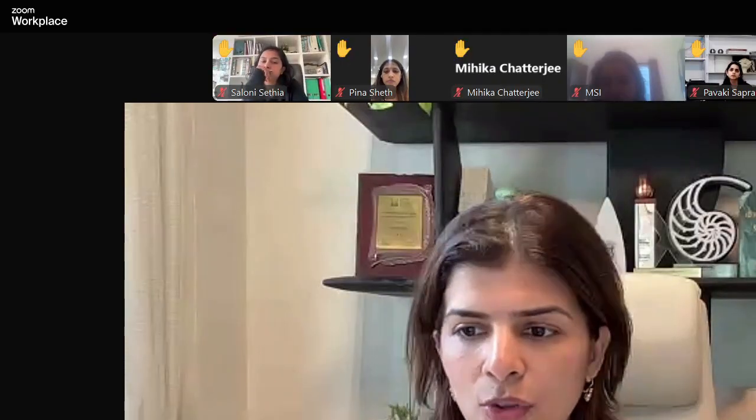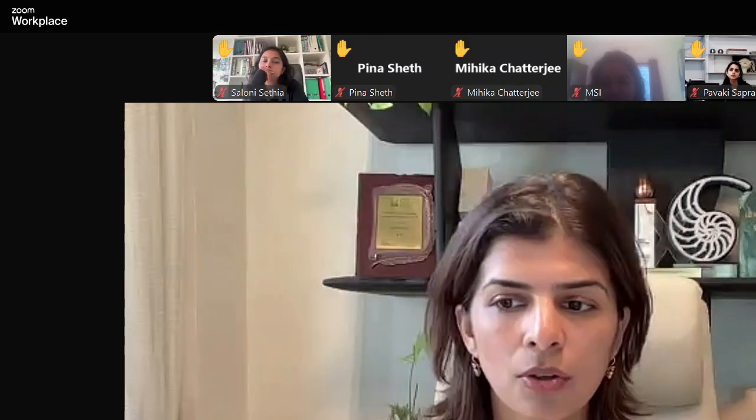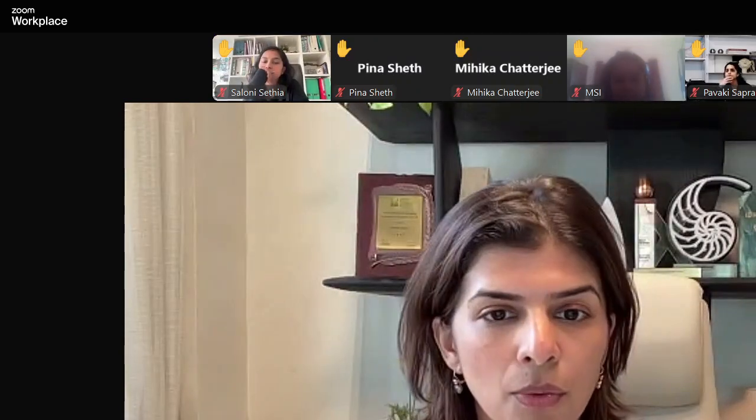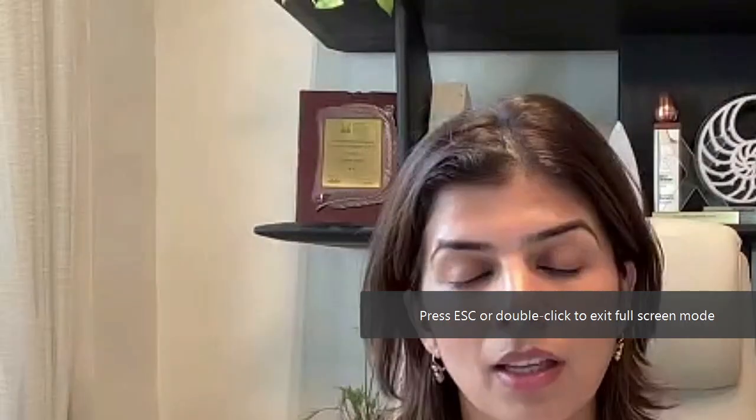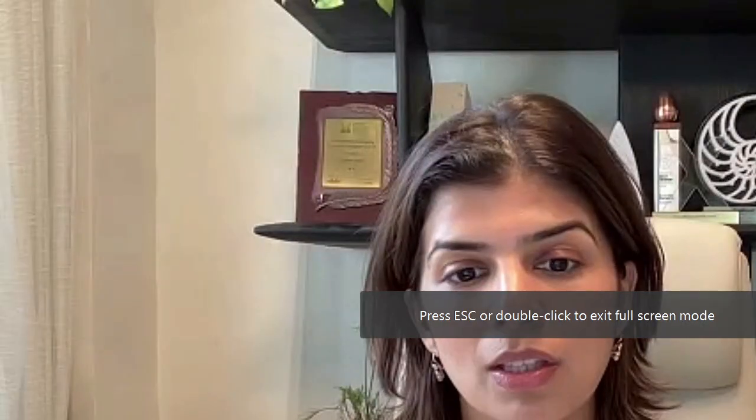Once the design is frozen, how do you deal with revisions? That's a really good question from Brinda. If there's a revision, we send an email that there's going to be an escalation in budget and an escalation in timeline. So that's communicated, and we work on a clear system where if the project extends beyond a certain number of months, we go into a monthly retainer. Clients don't want to move into that retainer model, which is why they are more incentivized to close off all these decisions.